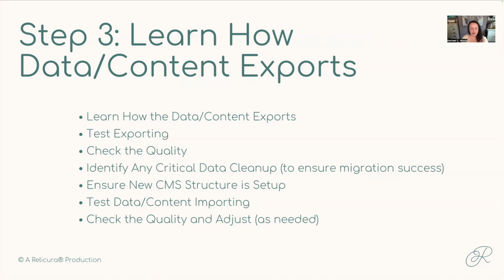Data will typically come out, the most common tends to be a CSV, comma separated value spreadsheet. As long as column headers are mapped accurately to the new system, then that is a good first start. Depending on how stringent the field formatting needs to be, you may find you still need to do data cleanup because the field formatting is different and perhaps more stringent than the system you were in previously.